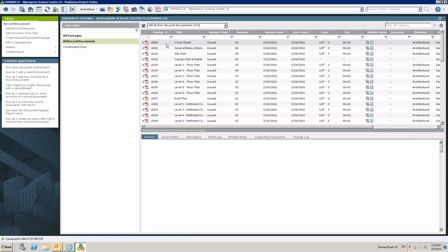Your document control acts like a more formal issue for any of those key deliverables on a project. So when you issue those out, they then become available on the Info Exchange website, and they'll get pushed directly to the mobile apps. That's how Newformer tracks whether they're the most recent issue or not. It uses that as the formal issue.